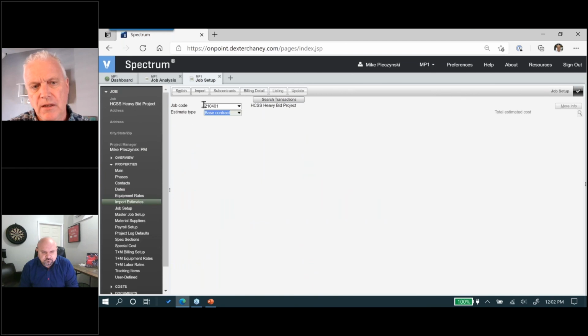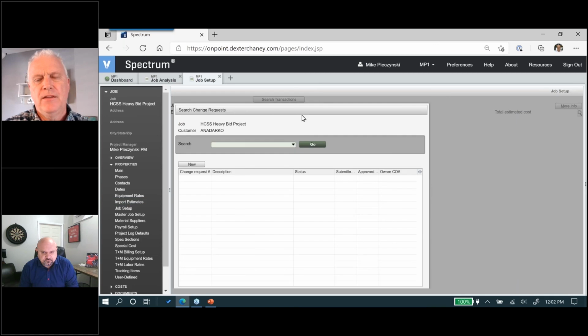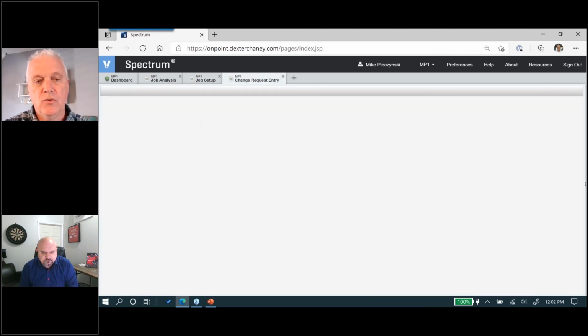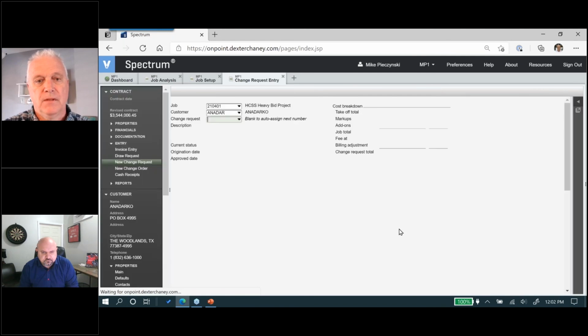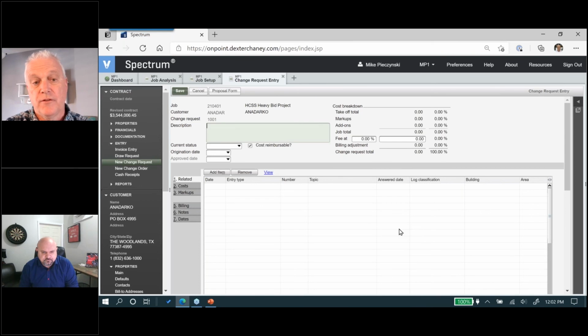And so this time, instead of the base contract, I'm gonna say I'm bringing in a change request. And now the system's saying, well, which one? I'll hit the pull down. Now in this case, I've not previously recorded the change. So I'll click on new. And I come to the quick add change field and I'll hit enter for the first one.